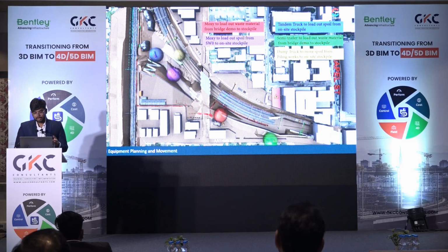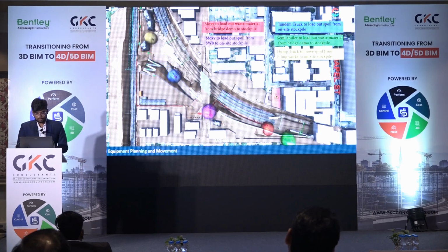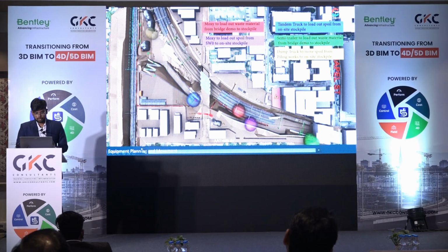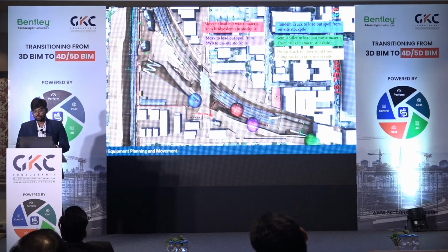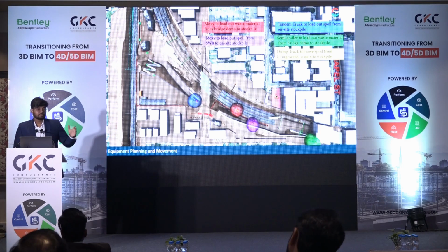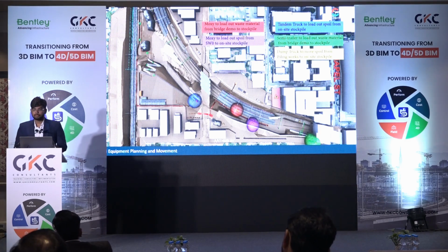And we have provided a balloon around the equipment, which shows the clear area it requires for turning, the turning radius, and whether or not it is clashing with any of the elements at any point. So this is a very good example of how efficient logistic planning, or at least having this data in front of you before the construction, can help the people who are actually going to do the construction. This is something we call digital rehearsal, because we are actually doing the rehearsal of the actual construction before the construction.